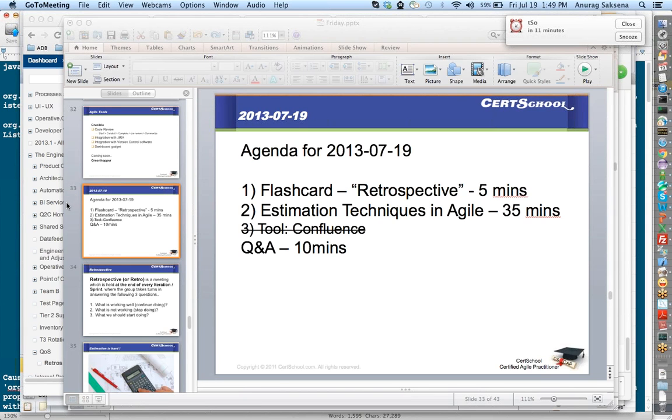Do we have anything bigger than 100? No. And like I was saying, if there's anything going over 13 itself, from my experience, I would relook at the story to find out why that story is so big to begin with. Having anything as big as even 40 or 100 is very unusual, and something that a scrum master or the team should relook at.